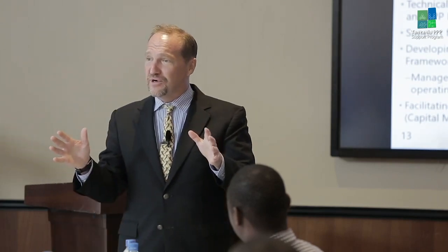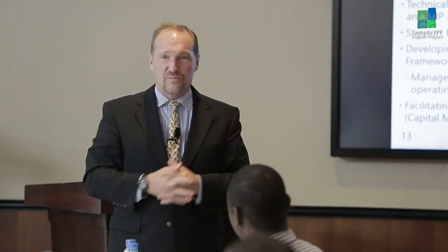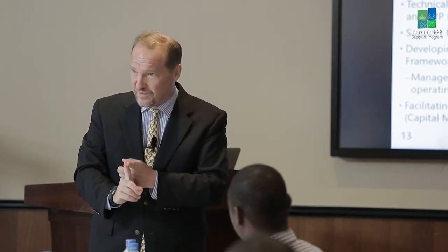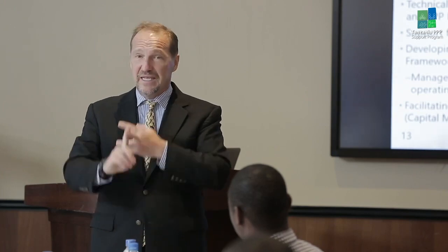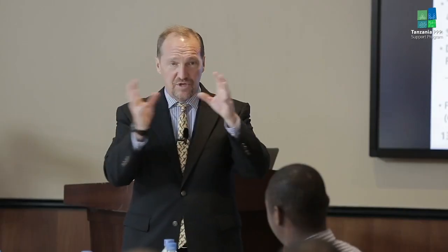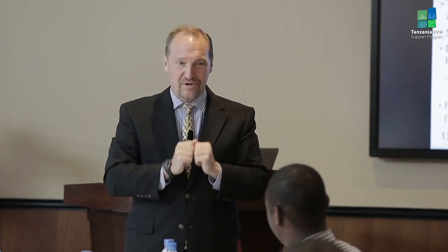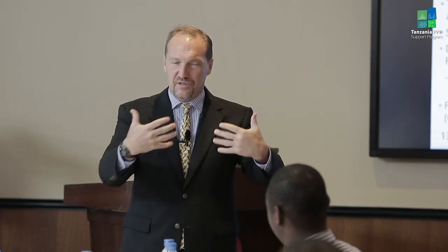Normally, under publicly financed projects, we assume all risks are borne by the public sector. When we make that assumption, we don't really have to identify all the risks as carefully, nor analyze them. And most importantly, we don't really manage those risks very well. When everything's done in the public sector, governments don't often do a very good job of managing these risks. Some of these risks, when you transfer them to a private partner, they say you're responsible for managing the risk, meaning if you don't manage it, you will bear the cost of that. That's what gets the private partner to manage those risks better.